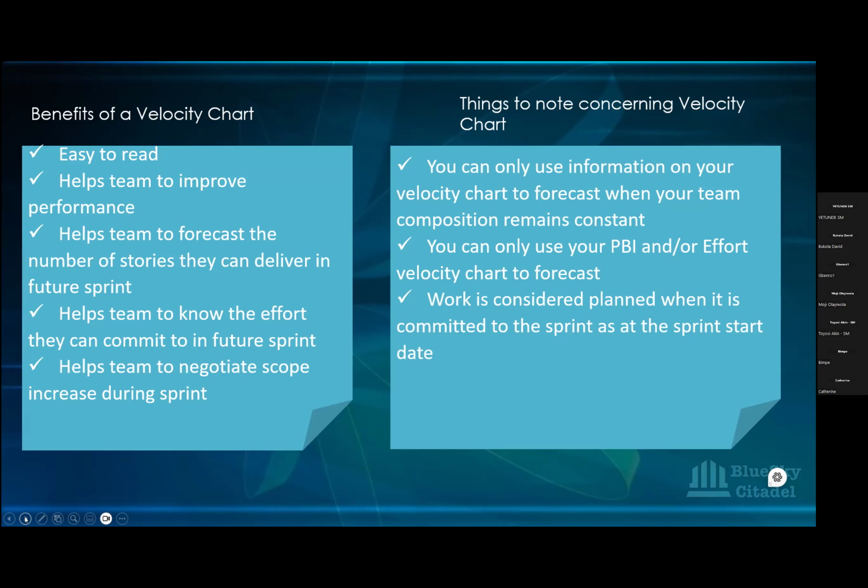You should be able to work out your capacity and your velocity to know what you can take in. So it's down to the product owner to prioritize the story points that will total that 45 that needs to go in. Now, you don't, as Scrum Masters or ADM or PM, go to the PO or the product manager and say, sorry, we can't take 90 in and everything. You explain to them objectively, and then you tell them, but peradventure, who knows, we might finish on time. We might be able to take more.